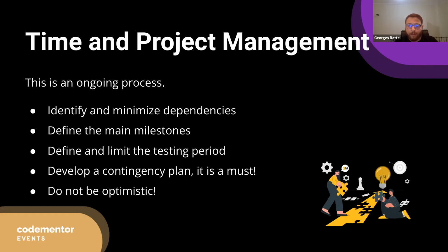So if you're not aligned with the client, and if you don't have these details before you start the project, or at least a certain date before starting this specific task, then you're going to end up losing a fair amount of these 6 days, sometimes even more than 6 days, to only get the API keys in order to just start the work.